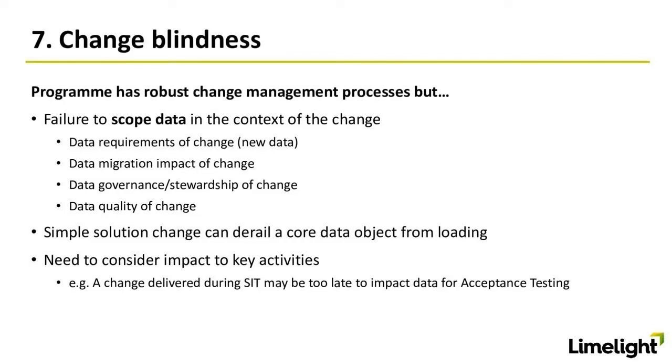And it's really important to consider the timing of all of this as well. As we've seen in some of the slides earlier, the data migration phase runs in parallel and certain things happen at certain times: the mock cycles, the load cycles, the preparation cycles. So the timing of that change request, and its impact from a data perspective, needs to be baked into that thinking, because a tiny change might not be safe to put live given where you are in the program, because of the impacts on data around the edges. So you won't make it in time, if you like, for your acceptance testing. So lots of